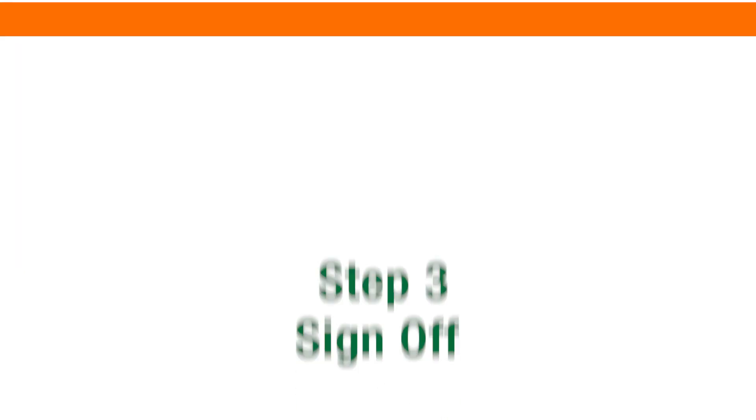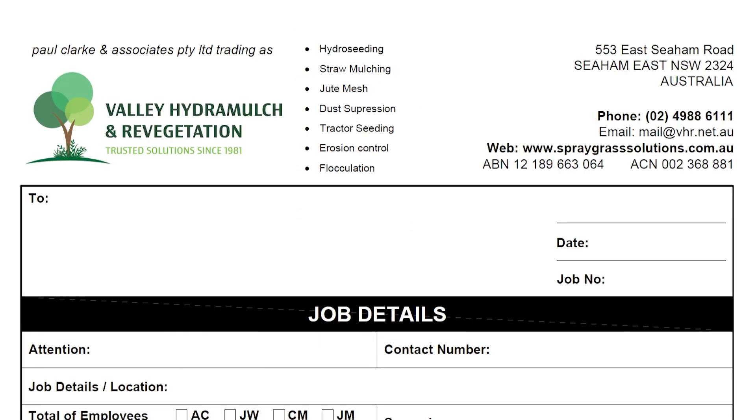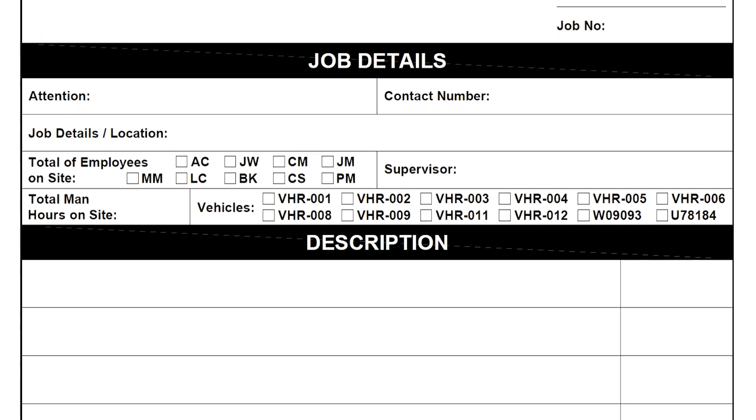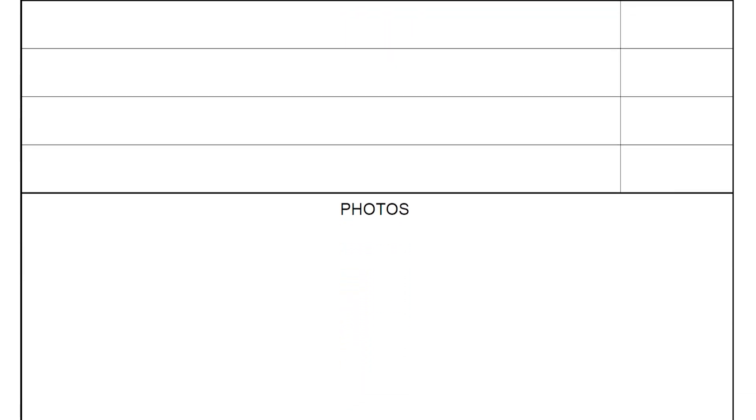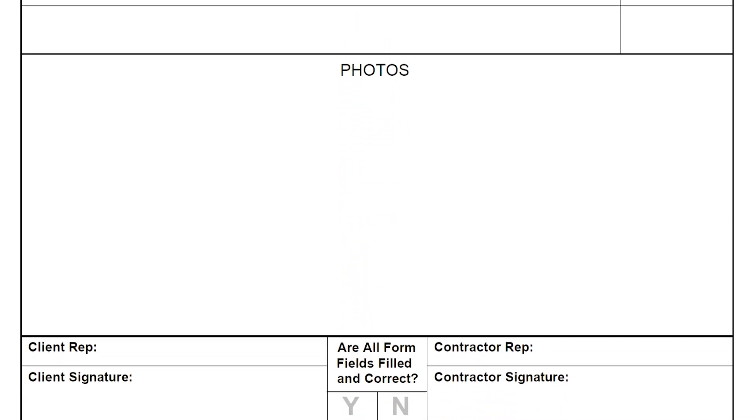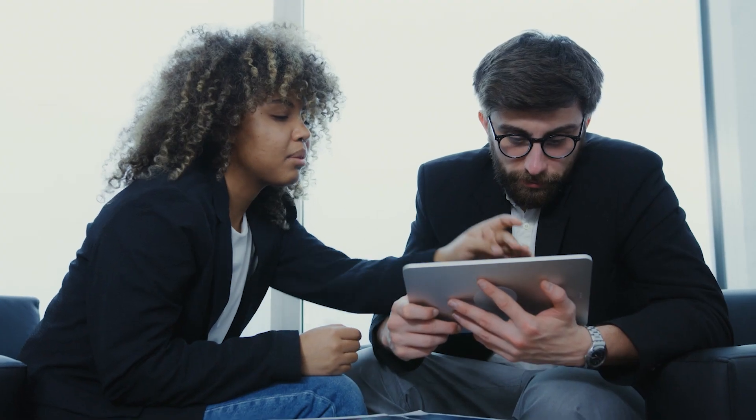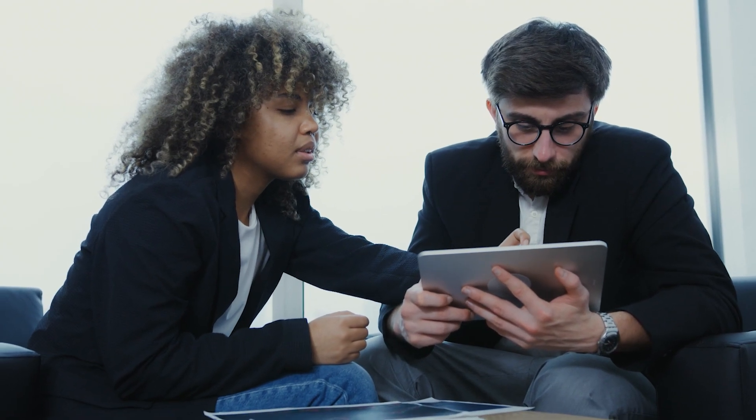Step 3: At the completion of works, a digital sign off sheet is created providing the project and client information along with the description of works carried out on site by VHR along with the accompanying photos. The client representative then signs this digital sheet.